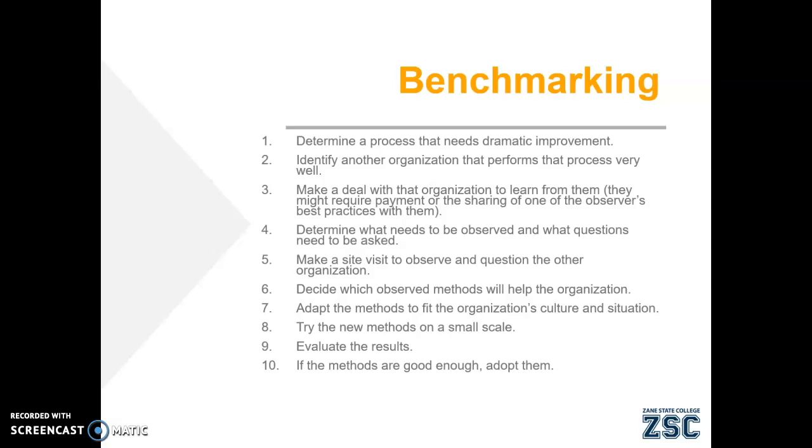The steps involved include, first of all, determining your process that needs to be improved, identifying another organization that performs that particular process very well, and then reaching out to them and perhaps striking a deal with them to observe them and learn some lessons from them.